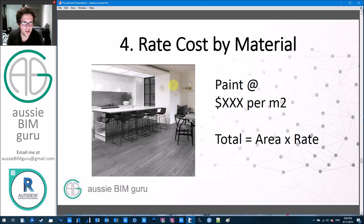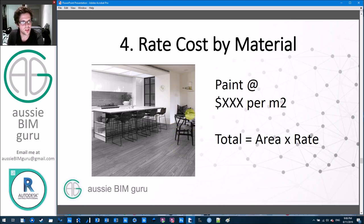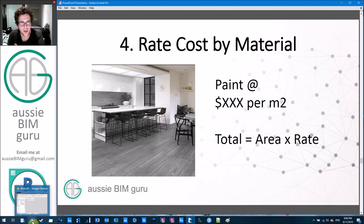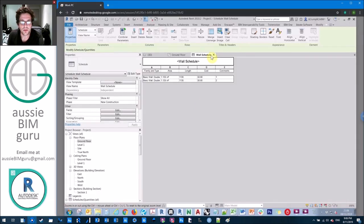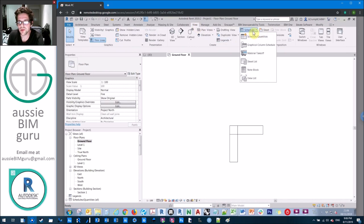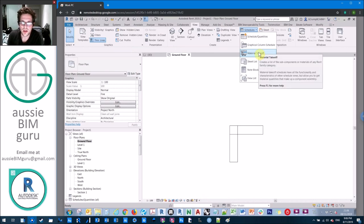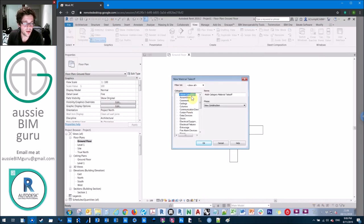Let's say we want to measure all the paint in a room — paint doesn't just occur in walls, it occurs in ceilings, bulkheads, and feature elements. There's so much to consider when costing by material, especially for trade-crossing materials like plasterboard. I'll just show you how the tool works. Under view and schedules there's a tool called material takeoff. It creates a list of subcomponents of materials from any Revit family category. You can do a multi-category schedule, but it won't pick up every single category.